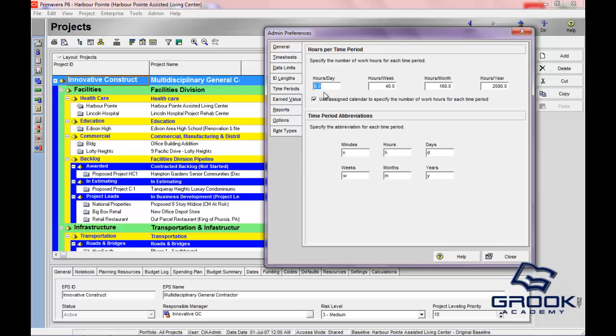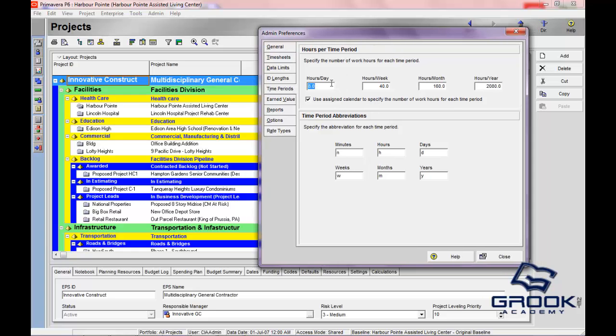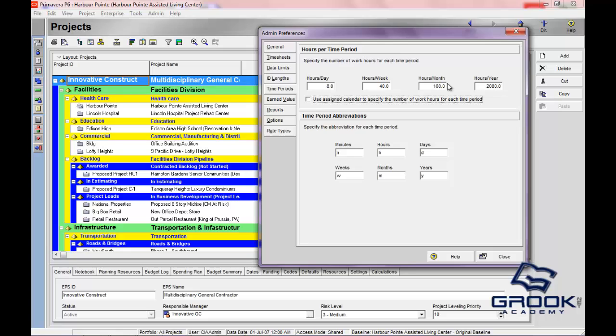Time periods, this is important. I think almost everyone uses this check box, which is to assign the calendar, or for P6 to utilize the calendar that you've assigned to the activity, because different activities can have different periods in which you're able to work that activity. Different crews, different times of availability, all kinds of different things. But normally the calendars applied are used. If you don't want to use this, you can go ahead and change these to 10 hours a day, and on and on. This would extrapolate out to hours per year.